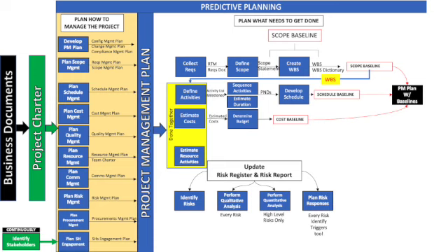For example, if you were trying to build a car, the work breakdown structure might be divided into the tires, the engine, the frame, the windows. But within the category of the tires, there might be a difference in the dictionary of making and producing the rubber, defining the type of material that'll be used for the actual wheel. All of these elements add up into what we call our scope baseline.